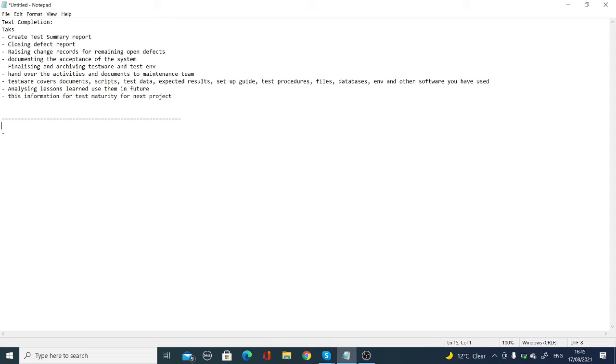Any question? What is the closing defect report? So you have a defect report. Whenever you raise any defect, you put in a note that these are open defects, closed defects. So every time a report is generated, it shows that many defects are there, that many are open, and in this new version this many defects have been fixed and retested. You need to follow it up. This is an open report.